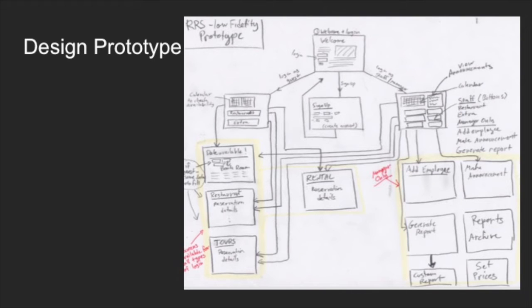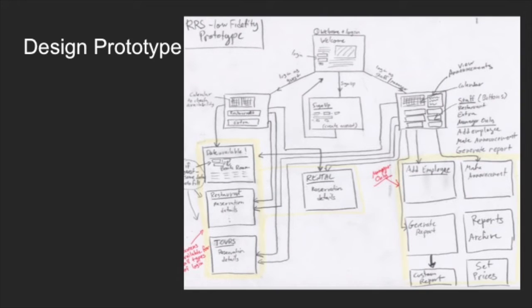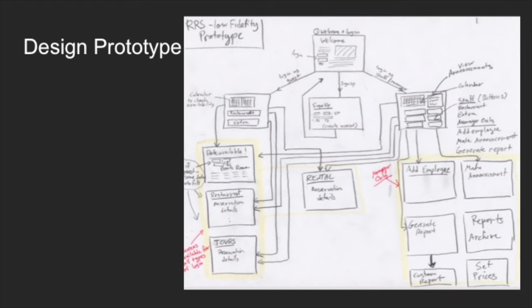In the JAD sessions, we will present to the customer the mock-up of the web app to give them an idea of the design implementation. The mock-ups are made using prototype software, Axure RP Pro, that allows quick modifications on the fly. This way, we can make modifications during the session in front of the customer for quick feedback.